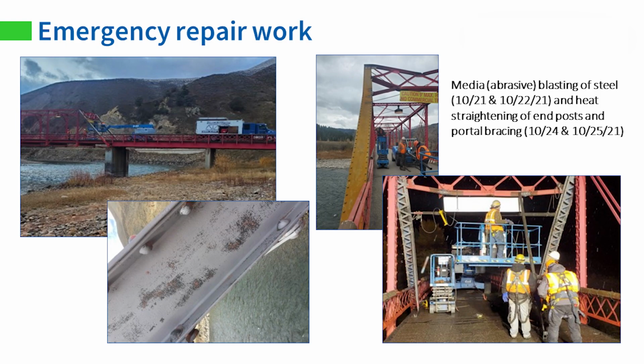Because we had a team, we were able to bring the contractor in. We were able to get moving on some early work packages to start fabricating steel. We were able to have them work with us. We actually had all of these sub-consultants that I showed on the previous slide coming into our design meetings. They were coming into our pre-construction meetings and actually walking through how to best accomplish this work. So you can imagine as a designer that it's really liberating because now you're not guessing. Now you actually have the experts. We call them specialists, right? You have specialists sitting around the table telling you this is the best way to accomplish this objective. And when you have that, you have something really, really amazing.